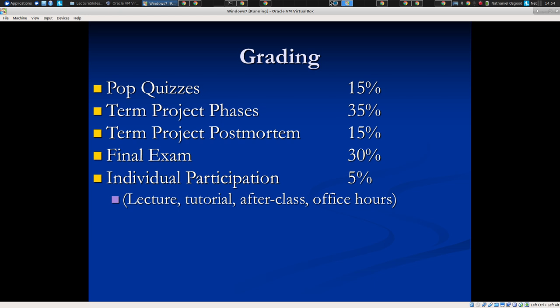But suppose it does. You still have a good chance to recoup a lot of insight if you have a postmortem that basically reflects on the whole experience. How could we have headed this off? How could we have known that it was going south earlier and responded to it? What best practices could we have put into place that would have let us avoid this whole set of issues? Basically, thoughtful reflection on what could have been done better, how you could have known sooner about the problem, et cetera. And this reflects one of the principles of this course, ladies and gentlemen.